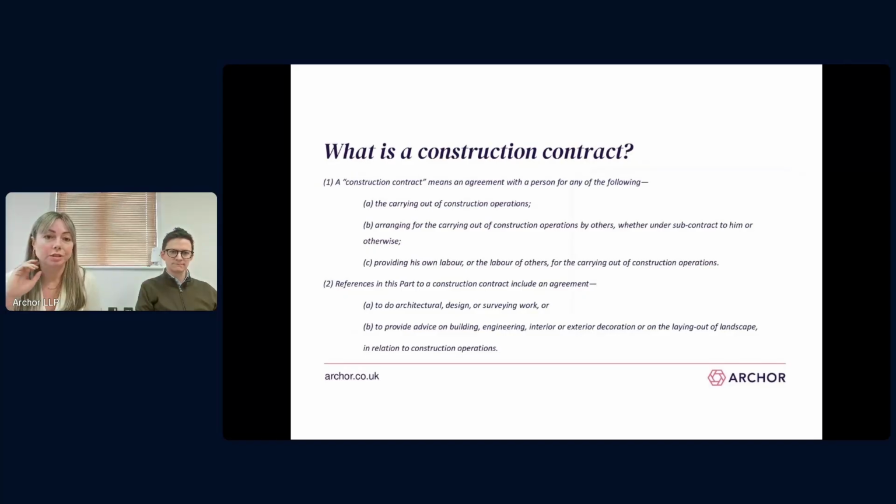So the wording on the slide is what is a construction contract. This is taken from section 104 of the Construction Act. Also just important to note that a construction contract doesn't need to be in writing. It can be a verbal agreement, and that gives the party the right to adjudicate.